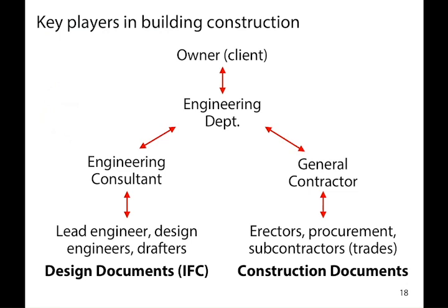The goal of the engineering design process is to generate design documents that can be issued for construction, IFC, that the client can take and say, these are a set of plans that you can build me something from. Engineering department's going to take that set of design drawings and say, contractors out there, I want pricing to build this for me. And they're going to say, who's going to give me the best price? Who's the best suited to do that thing?